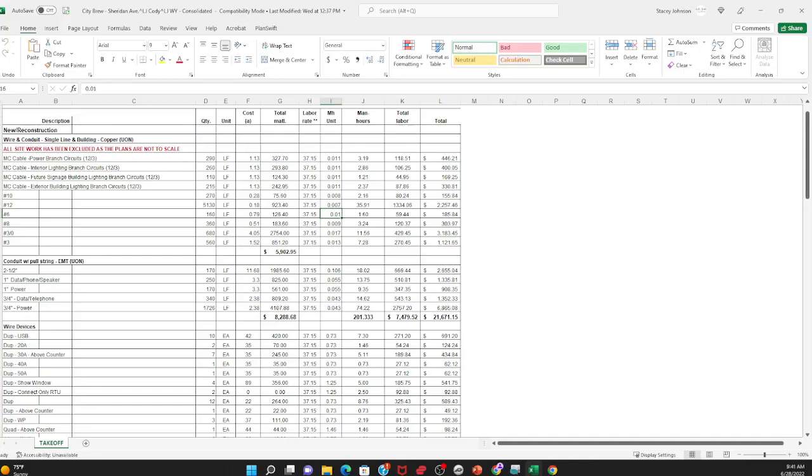Right. I mean, you give them the same information as you're getting. Let them know the lead times, and each estimate is only good for so long. We've not ever gone more than 30 days when it wasn't bad. So yeah, I wouldn't guarantee any estimate more than 30 days, and you just have to keep them on a continuous loop of following up because that's just the way it is.